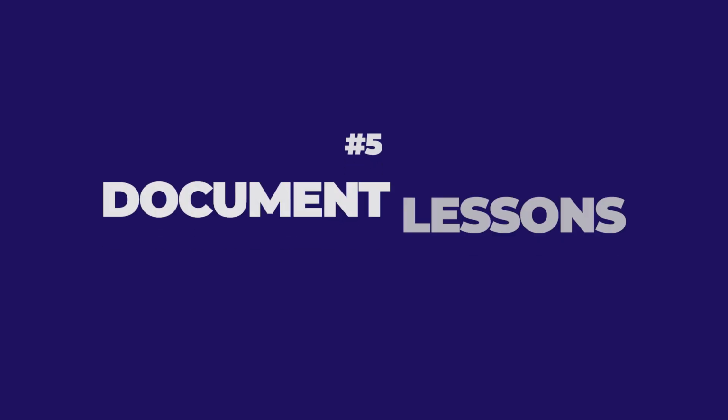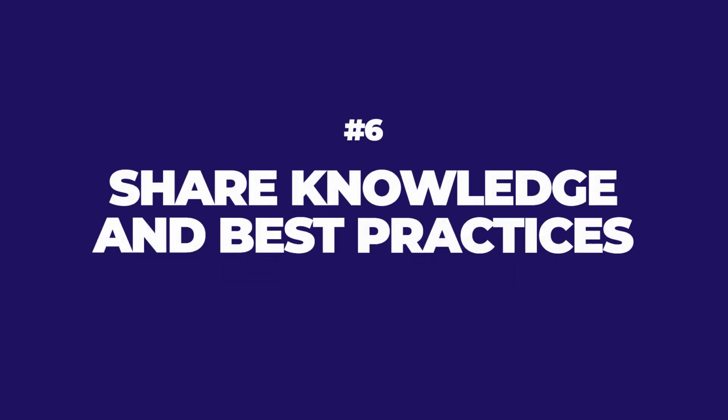Number five, this is often forgotten. Document the outcomes and make sure that it is clearly written down what you did to fix this problem, the successes, the challenges, the insights gained, basically what did we learn from this, so that we can, number six, share across the organization. And this is where we get into the Paul Akers style, where we do before and after videos or we share solutions so that other people who will have similar problems can learn from it.